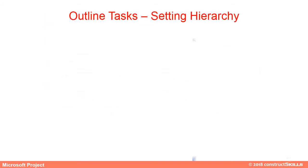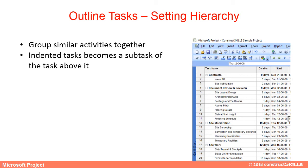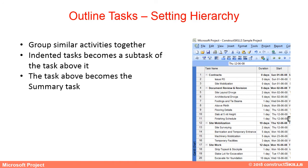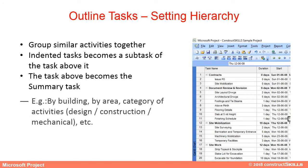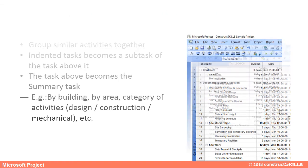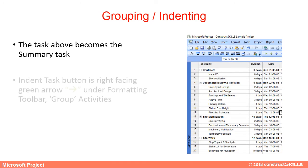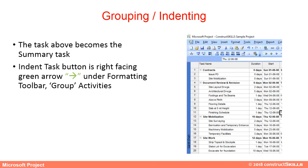Outline tasks group similar activities together. Indented tasks become a subtask of the task above it, and that task above becomes the summary task. For example, grouping by building area categories such as Design, Construction, Mechanical, etc. The Indent Task button is the right-facing green arrow under the formatting toolbar, used to group activities.